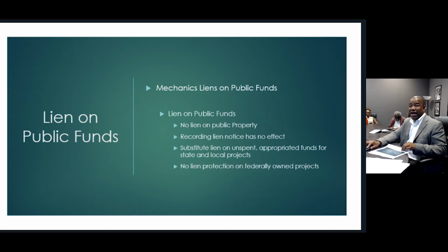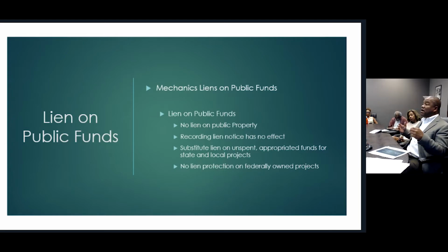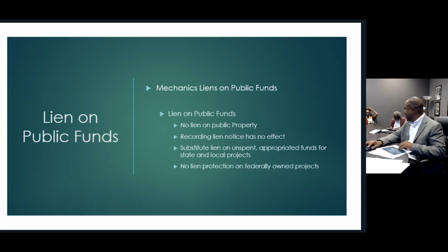Oh, and by the way, there is no lien protection on federal jobs. That's one of the things that offers a subcontractor or a contractor some protection, a surety bond on those types of jobs. Okay. But that's another presentation, and I won't dive too deep into that.